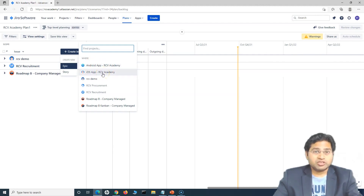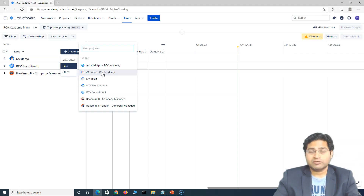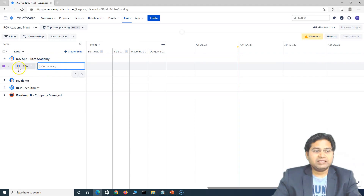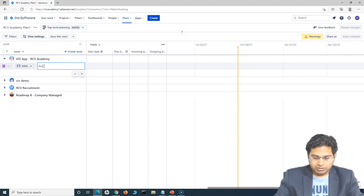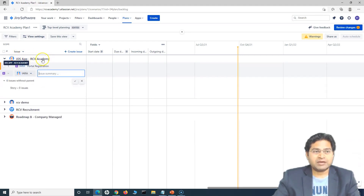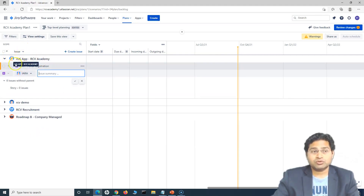As part of my portfolio, when I'm launching my website, I also want to launch the iOS app and the Android app. So there is an iOS team and an Android team working on the different mobile applications, and then there is a team that will do the website. For example, this company-managed project, which is roadmap B Kanban. So I want to create an epic in the iOS app — I'll select that and provide the issue summary: portal registration. So this is my high-level epic, which will have multiple user stories below it. That epic is created, and now you will see that iOS app is listed because previously there were no issues.